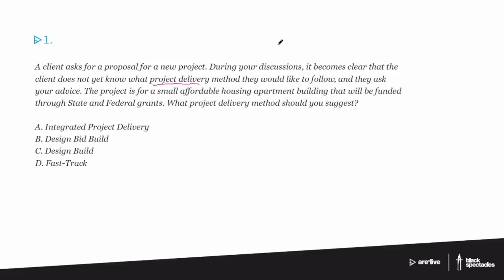If you're the architect going to work with somebody, there are many different ways the overall project can get done. It could be that you and your partner design it and your partner builds it — that would be design-build. Or the owner could hire a construction manager who's deeply involved, with this third-party person looking over your shoulder. There are many different ways to do it, each with advantages and disadvantages. Some take longer, some are faster, some are cheaper, some more expensive, and each has different contracts and ways that everybody relates to each other.